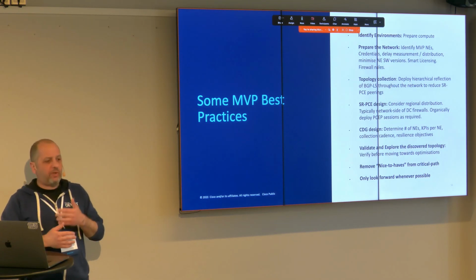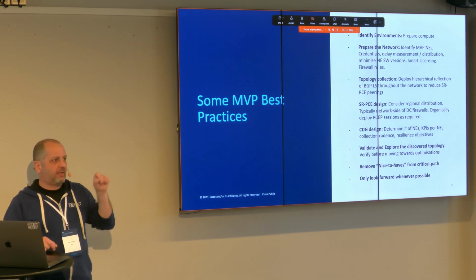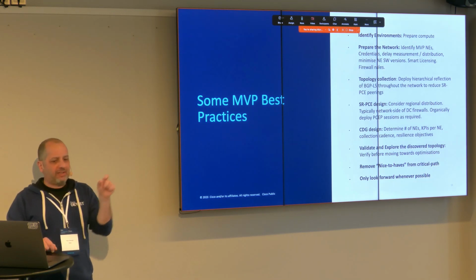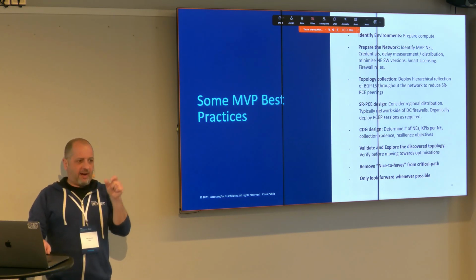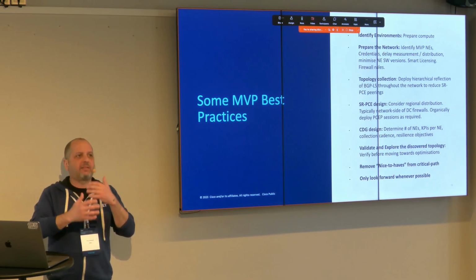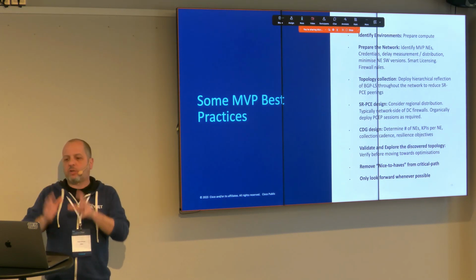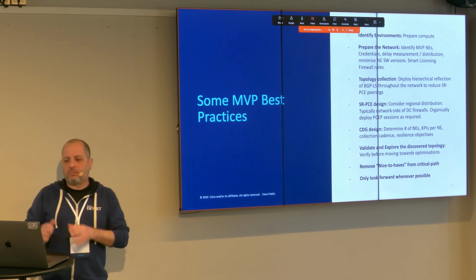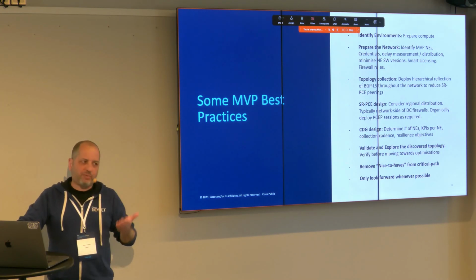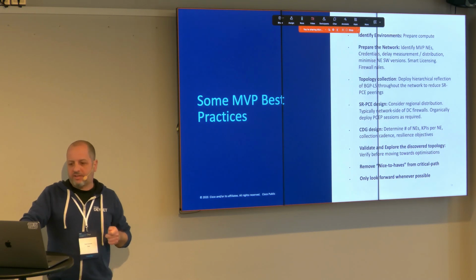So familiarize yourself with the first use case. Make sure that all the transport services that you run today in the network follow the path that you expect. Make sure that latency readings from the network are accurate and not wrong. Take the time to check that the topology is what you expect it to be, and that the transport services running on top of the topology are the ones you expect them to be, and so on, before moving to provisioning use cases or traffic optimization use cases later on. So the message is prioritization again.